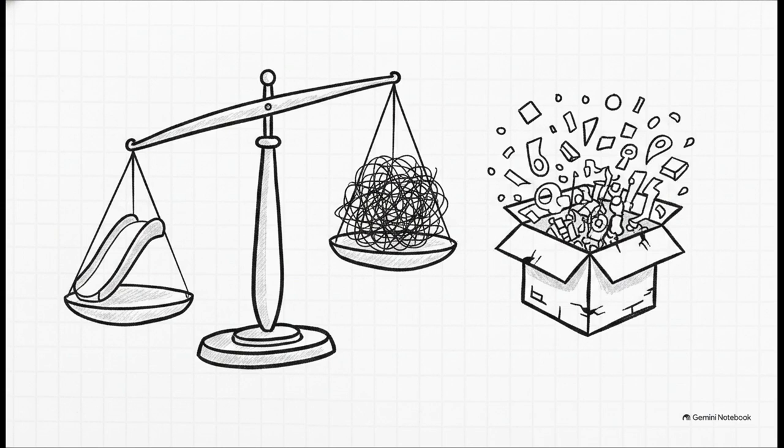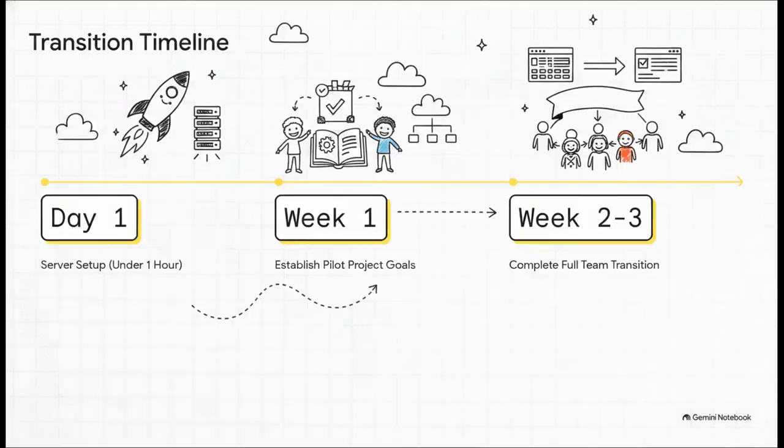You've got modest PHP-compatible hosting requirements, or you can use the official cloud version. But keep in mind, Leantime trades the advanced dependency management of a tool like OpenProject for a noticeably gentler learning curve. It lacks those complex Gantt dependencies, and the reporting is less granular. You're also working with a smaller community ecosystem. Basically, if you have very complex projects, they might eventually outgrow it. But if it is the right fit for you, the transition is incredibly smooth.